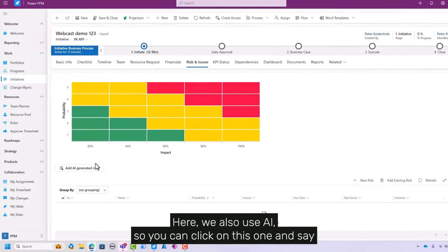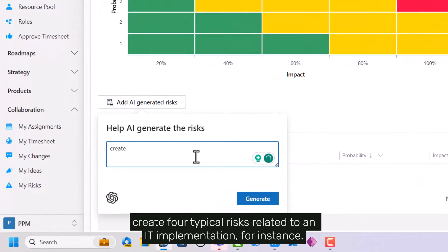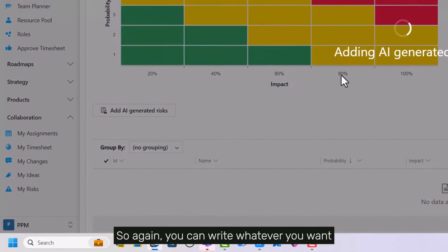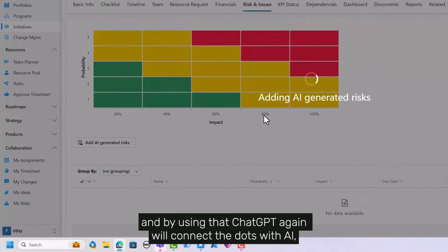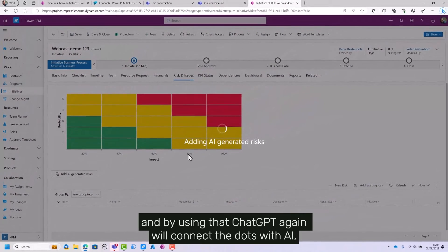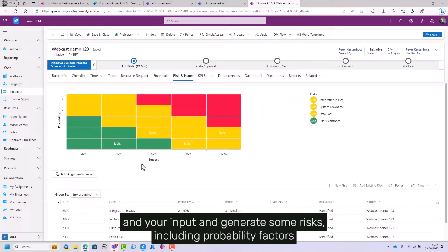Here we also use AI, so you can click on this and say 'create four typical risks related to an IT implementation,' for instance. You can write whatever you want, and ChatGPT will connect the dots with AI and your input and generate some risks.